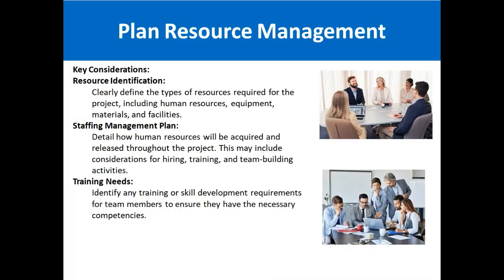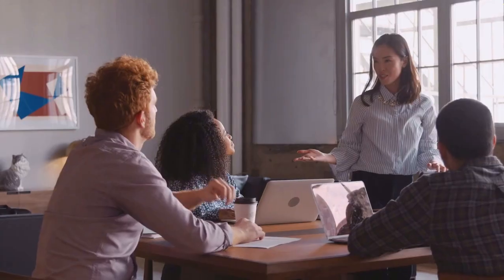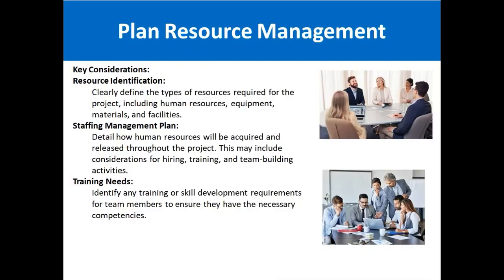Then a staffing management plan. This may include consideration for hiring, training, and team building activities: which types of resources are required, how will you hire them, from where you will hire them. Training is also very important, like training for the existing resources. For example, you have software developer resources available. However, the technology you are going to work on is new, and you know that your team doesn't have complete control over those technologies. So it is better to arrange training for them.